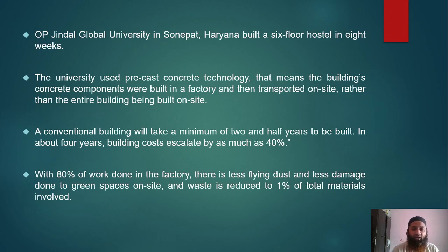A conventional building will take a minimum of 2.5 years to be built. In about 4 years, building costs escalate as much as by 40%. See, the construction time is increasing as well as the construction cost is being increased up to 40%. You just imagine what is happening here. Here you are trying to reduce the time as well as the cost also.